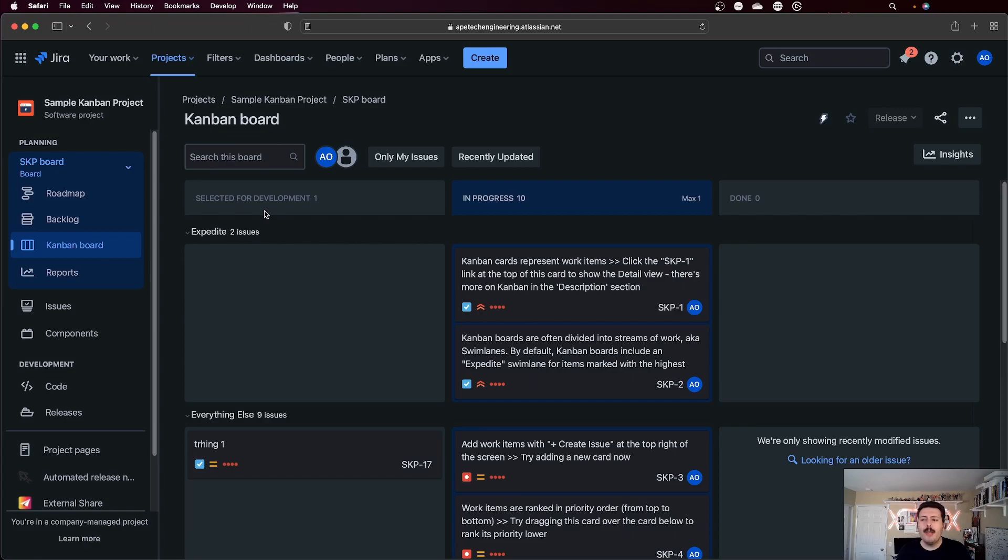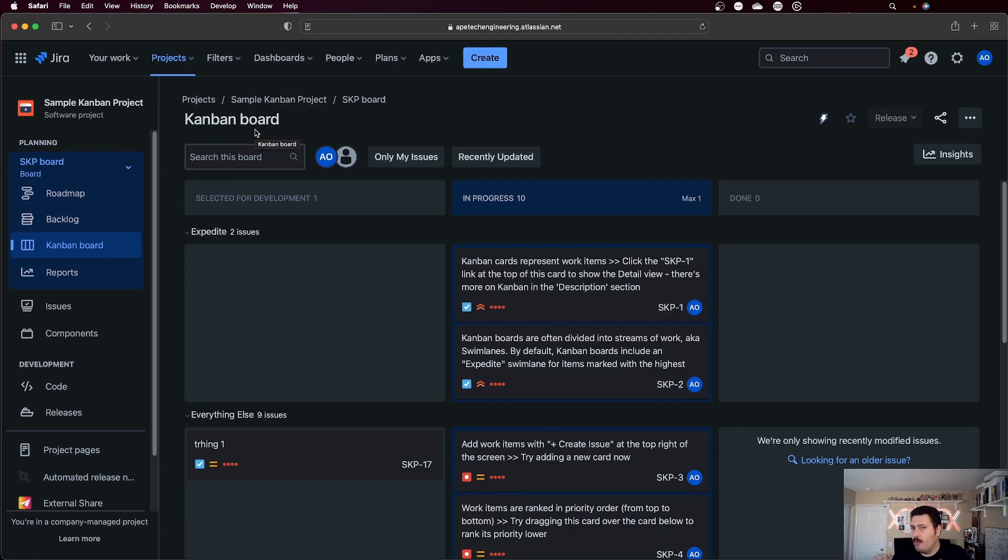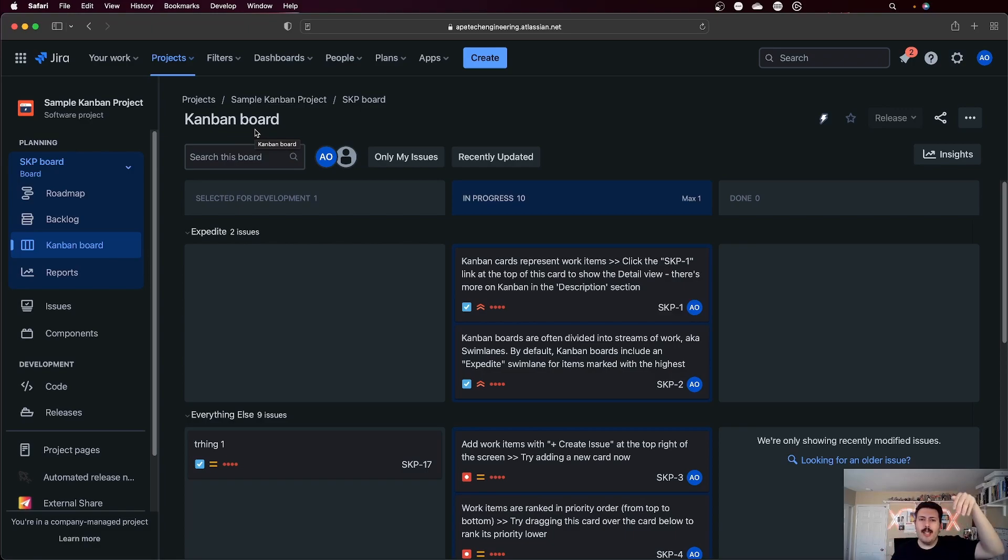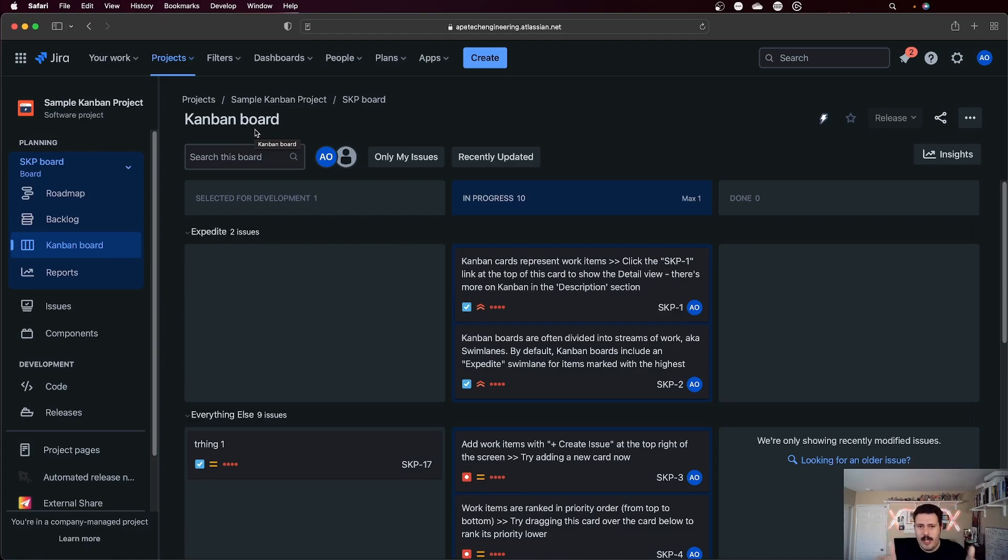Now let's talk about some of the limitations, some of the bad things. The first thing is your basic roadmap capabilities will break kind of. You are allowed to have multiple boards in one project. Those roadmaps will not break because the criteria is still within that project. So you're probably just going to divide the work, the issues in that project into different categories, maybe by component, maybe by release, maybe by the team field, maybe by a custom field. As long as it's still within that project and the issues all live in that project, you're still good.